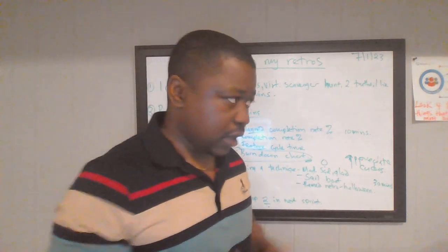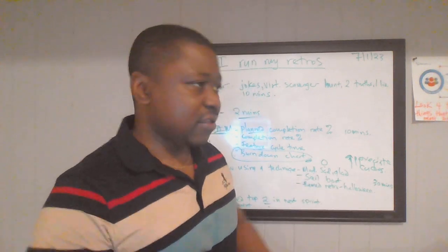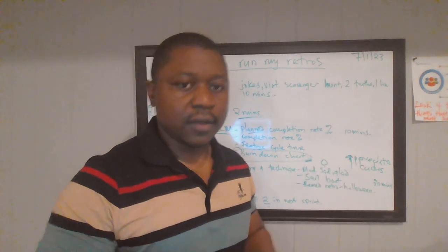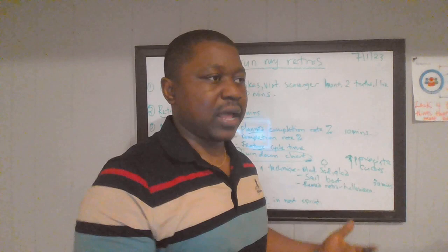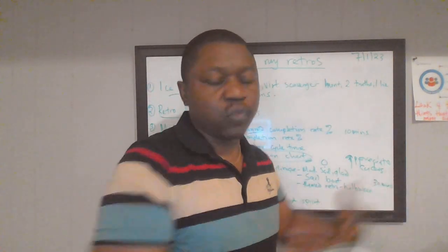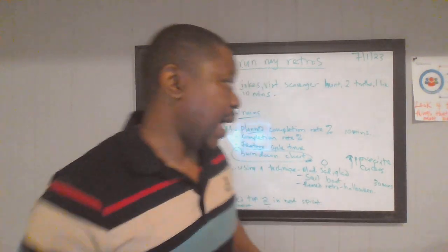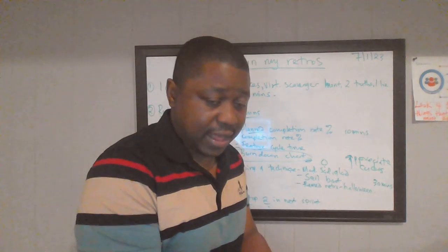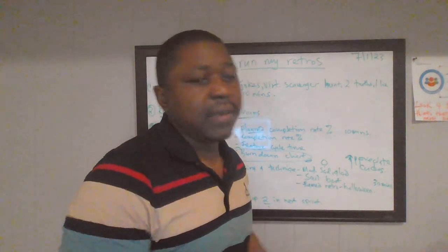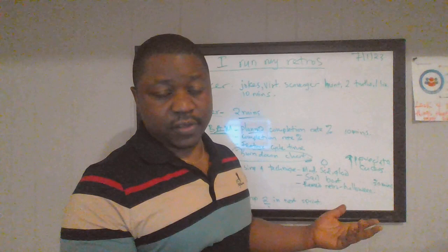So what is planned completion rate? I try to explain to my team that, hey, we planned 10 stories, with a total of about 20 story points, for example, and we actually completed and the PO accepted maybe 8. That's 80%, and it had 18 story points, for example.